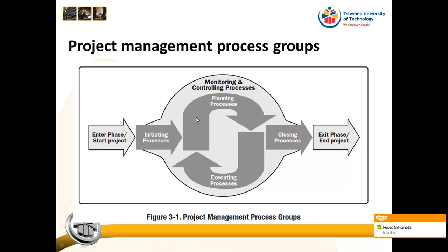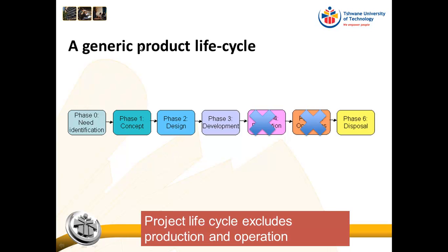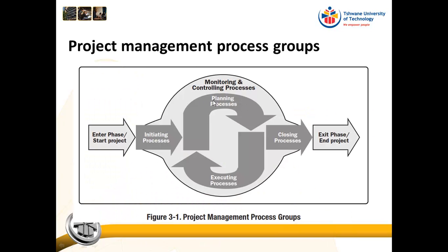Right, and then you can see that there are planning processes that happen. So before we can do the design of the project, let's say that it's a house, before we can start doing the architectural plans and purchasing the equipment and purchasing the materials, etc., we have to do a planning process. So for each of our phases, we might have a high level work breakdown structure at the start, but what this implies is that when we go into phase 2 and we are now busy doing phase 2, we will have a detailed planning process for that phase.